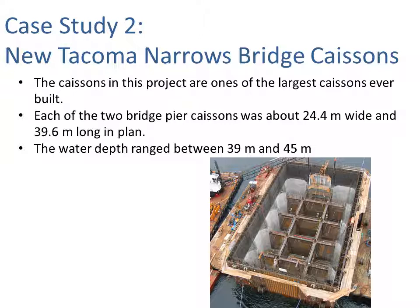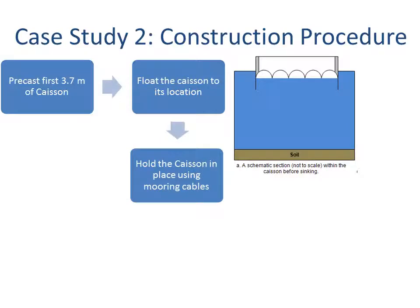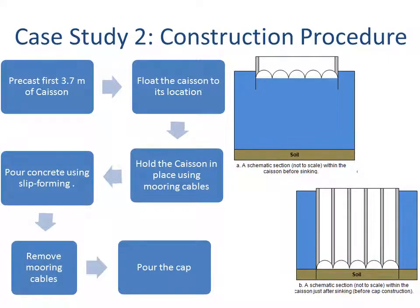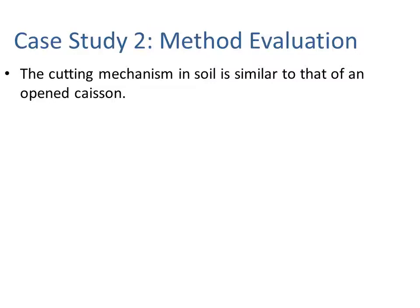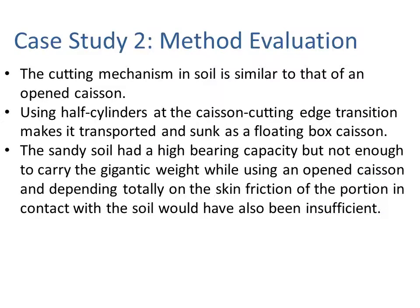The second case study is the New Tacoma Narrows Bridge, featuring some of the largest caissons ever built. Each of the two bridge pier caissons was approximately 24.4 meters wide and 39.6 meters long in plan, with water depths ranging from 39 to 45 meters. The construction sequence involved precasting the first 3.7 meters of caisson, floating it to location, holding it in place with mooring cables, pouring concrete using slip forms, removing the mooring cables, and pouring the cap.